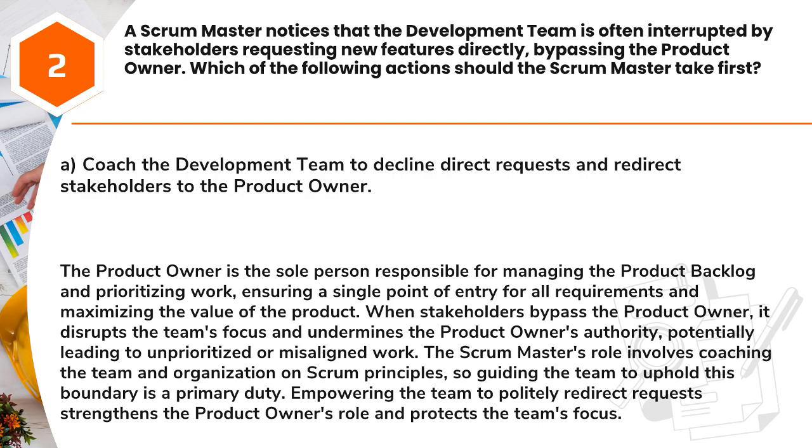Answer: A. Coach the development team to decline direct requests and redirect stakeholders to the product owner. The product owner is the sole person responsible for managing the product backlog and prioritizing work, ensuring a single point of entry for all requirements and maximizing the value of the product.